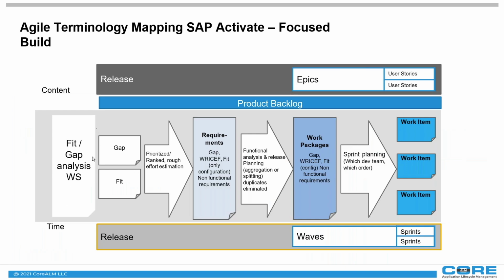Ideally, when you go through your fit gap analysis workshop, you can identify a gap or a fit. Regardless of whether it's a gap or a fit, you're going to capture requirements for that, and then you're going to prioritize that requirement from a rough estimation perspective. If you do have your SI helping you, they are the S4 experts. They should give you a pretty good effort estimation of how long it would take for a gap or a fit to be either configured or for that gap to be designed, built and completed.